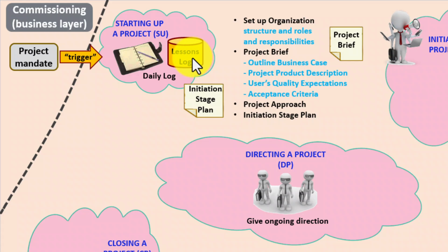This needs to be set up, and it's normally the project manager that will go out and investigate and find any lessons that would be suitable to be applied to this project. If your organisation has a project office or a project support part of your organisation, they may well indeed have this information in some form of a library that can be used by the project manager. So these lessons can be applied directly to this project.